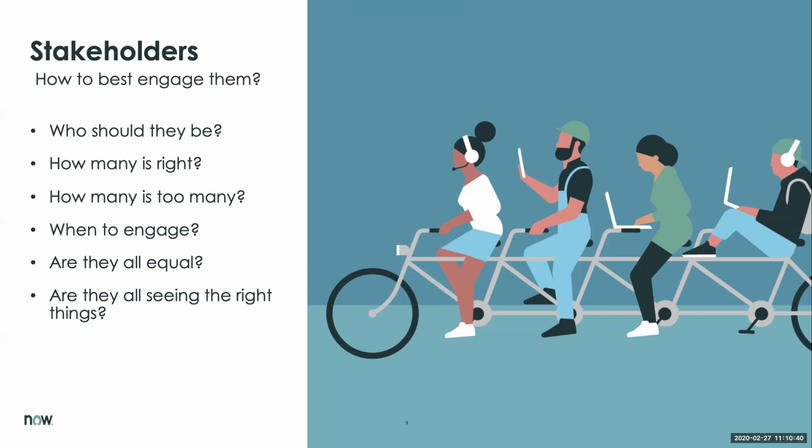If you're doing work for an internal business unit or even external clients, there may be a lot of people that you would put on a watch list for this work just so that they can track the progress of it, but they wouldn't actually be a stakeholder. A stakeholder is usually going to be someone who's providing some kind of input. Maybe they're managing, or taking assessments about the work. They might have some approval rights. They're really someone who's going to have some kind of decision-making power.